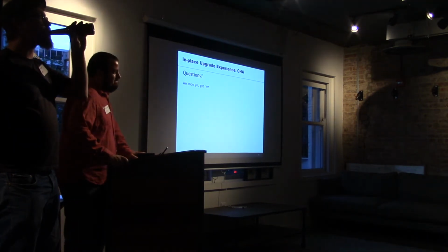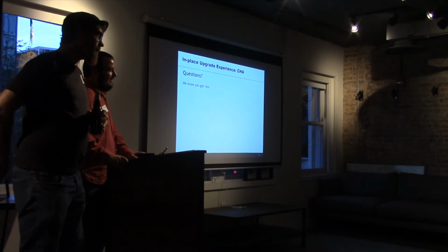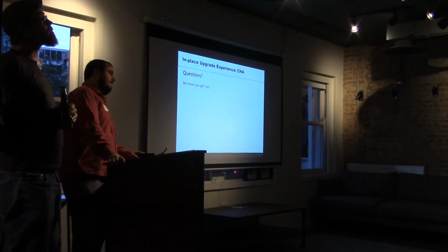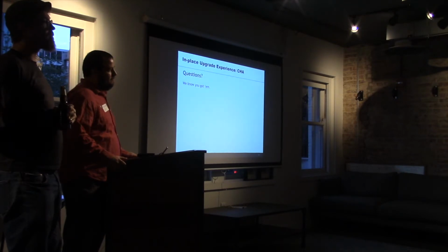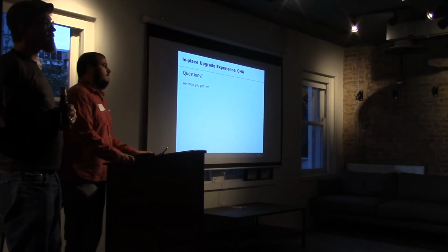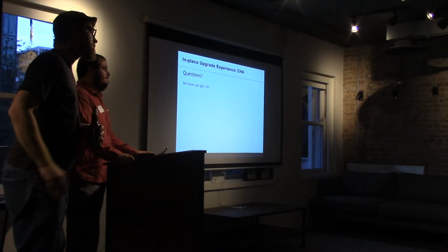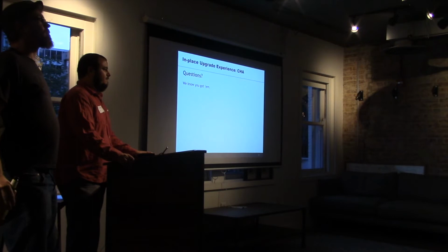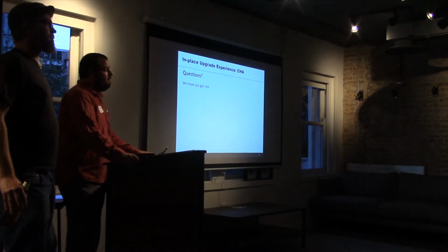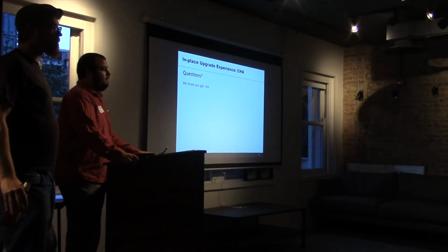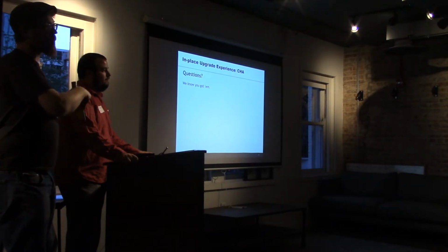So one thing I want to point out, because this is something that when we've done other upgrades has caused us issues, and we mentioned it several times, but I can't emphasize it enough. There's upgrading the core Sitecore, which is great and pretty smooth, but everybody has to go through that, right? So there's a lot of troubleshooting. When it comes to modules, though, that's a much smaller community, and there are issues that haven't been fully vetted, fully sussed out for some of these modules. The more popular the module is, the more likely it is that somebody's encountered a problem while upgrading it. You can get some troubleshooting. The more rare it is, the harder it is to find information on.